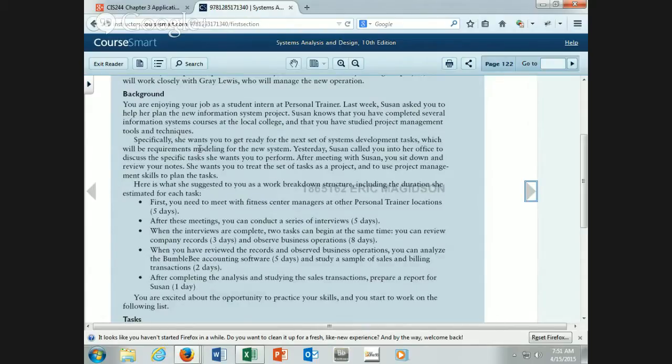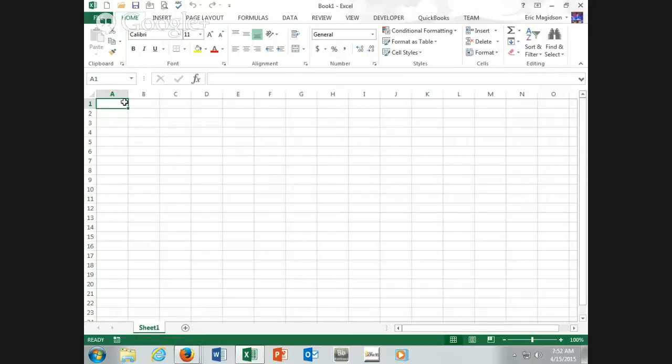And then also, in the real world, we need to look at weekends. We need to look at people's vacations, right? A task may only take 5 days, but it's during that time when someone's going to go on vacation, so it may turn into a 10-day task. Does that make sense? So what I would suggest is opening up Excel. And does anybody have the book?